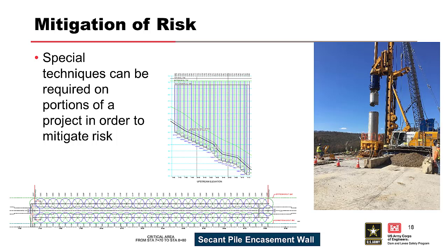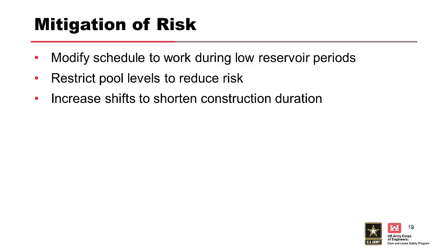This slide shows risk reduction and mitigation measures used during construction of the USACE project at East Branch Dam in Pennsylvania, which consisted of a cutoff wall project. The project included using a cased secant pile method to mitigate the potential for major slurry loss and excavation instability in a critical area where the embankment had been damaged by a previous internal erosion incident. Other methods included requiring that the work be scheduled when the reservoir is historically low, with specifications requiring high-risk activities to occur at low reservoir stages, reservoir restrictions to lower the pool, and requiring shorter construction durations.